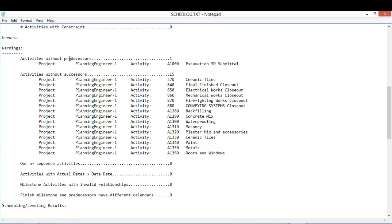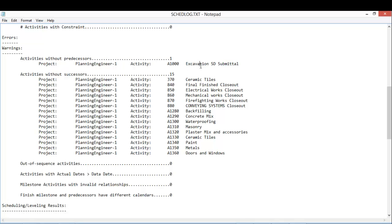The activity without predecessor. Activity without predecessor - this activity ID and this is the activity name. Of course, the activity is the first activity in my program or time schedule.